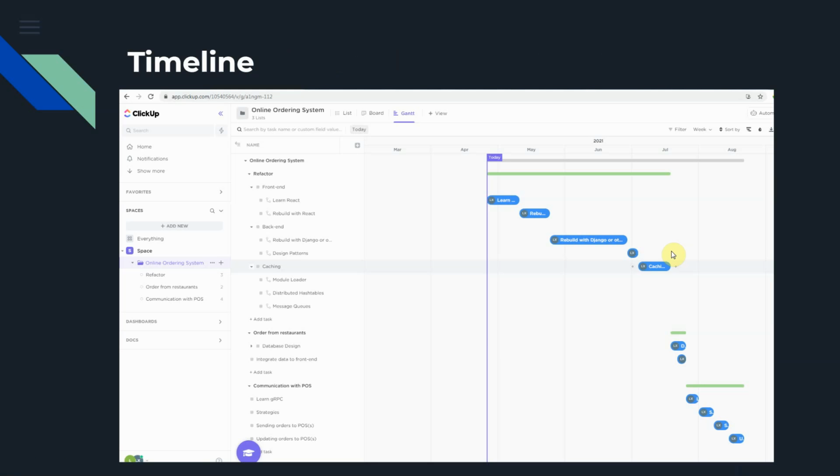So this is a rough timeline based on the work breakdown structure, and I added manageable tasks under all the categories. And this tool is pretty useful. It will generate the Gantt chart from a straightforward list. You can also update the duration of each task very easily.